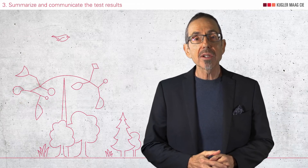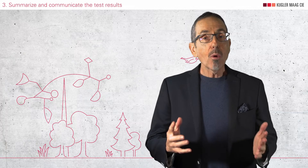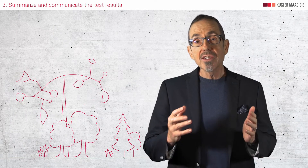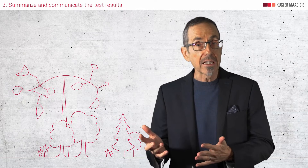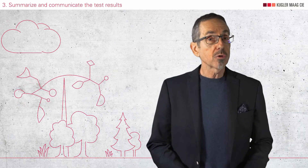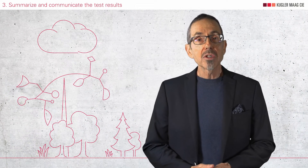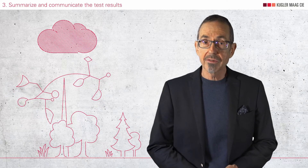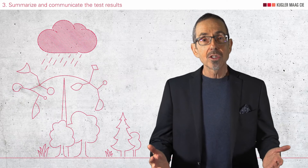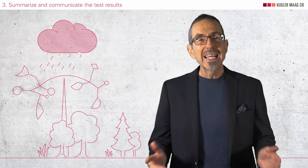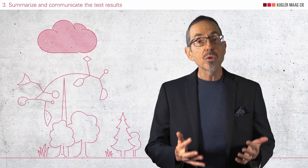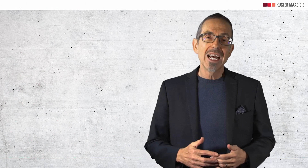Here is a counterexample I often see in my assessments. The report contains pie charts showing the 539 tests that should have been performed, of which 75 could not be performed and 34 failed — and that's it. There is no information about why the 75 tests could not be carried out and what the risks are, nor about how big the problem is with the 34 failed tests. The report also does not show compliance with the software architecture — in fact, the software architecture is not mentioned at all. They would need to relate the pie chart to the 247 architectural elements, not just to the 539 tests.